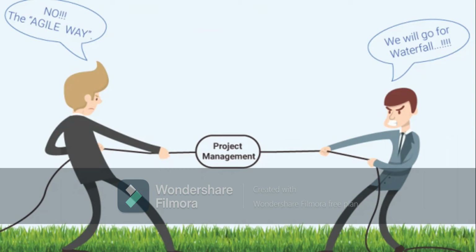In all cases, when we have traditional waterfall and the customer doesn't know what he needs, we just sign a time and material contract with him, right? It means that every research we're going to do, you're going to pay for us. So you find that the customer is paying a lot of money and gets nothing at the end. So that's the point. And from here, you need to decide which is the best methodology, whether we use Agile or Waterfall, for the sort of project, the type of project and the size of the project.